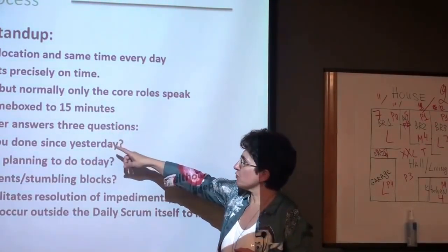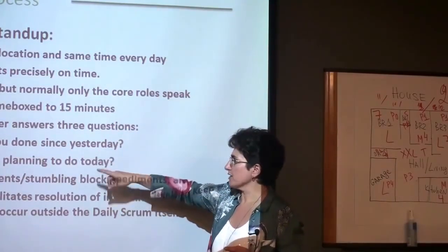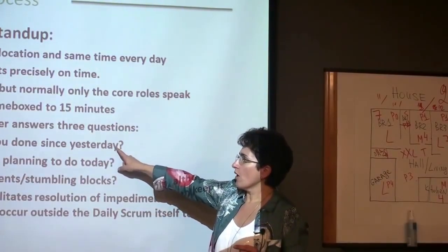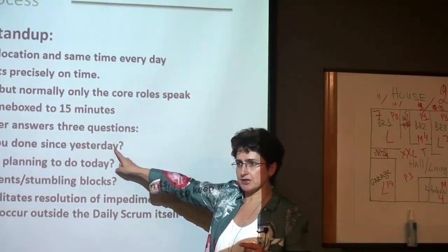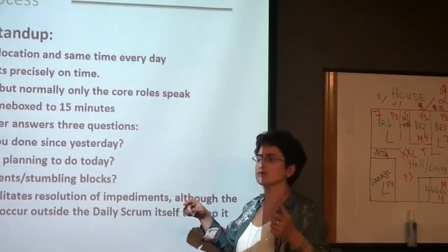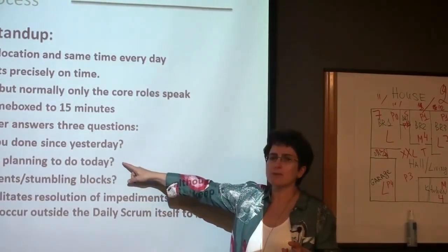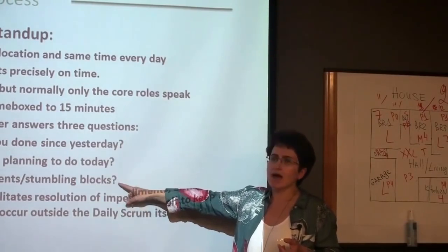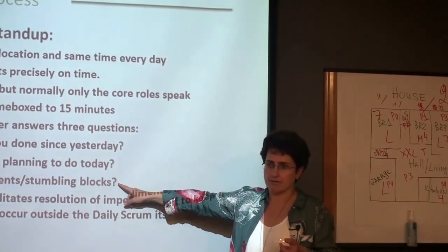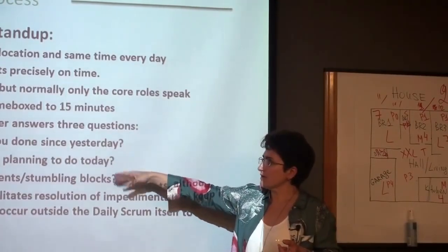And each team member will be asked these 3 questions. What is your progress since yesterday? Right? So you should be able to track yourself on a daily basis. And what are your plans for today? And are you blocked on something? And again, these are very quick questions.